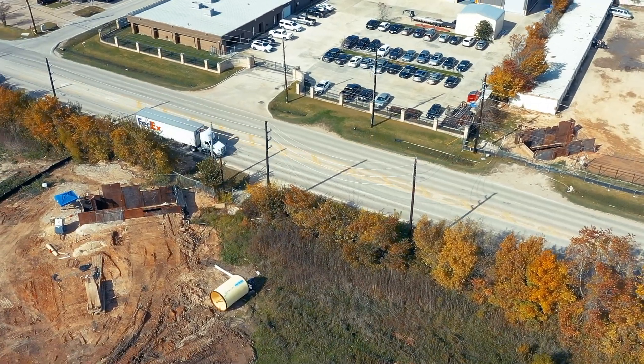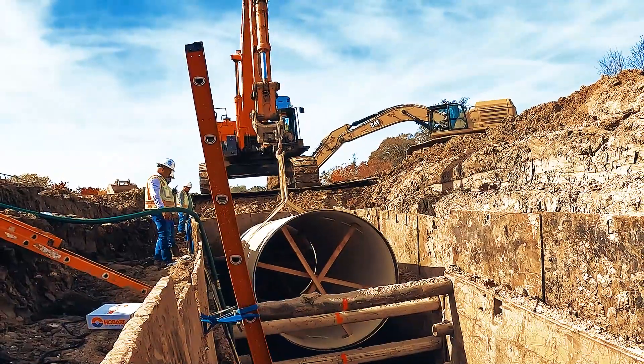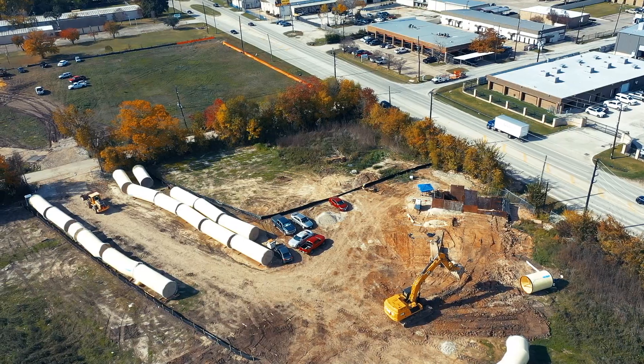On this project, there's 19 total tunnels. Three of them require the Infrashield pipe. With the double weld, it's installed using pipe jacking rather than installing joint piece by piece — it's installed in a single run rather than how we normally do it.